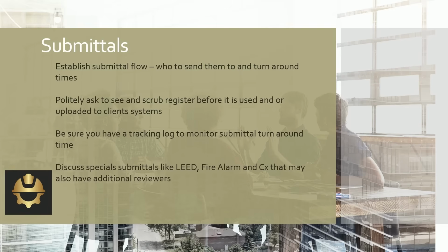They've got to provide their comments if they have comments and things that need to be changed. You've got to send it back to your dedicated designer, and then once everybody gets done reviewing it, it finally goes to your client. And that takes time, right? Yeah. It's all time that you've got to account for and you've got to track.